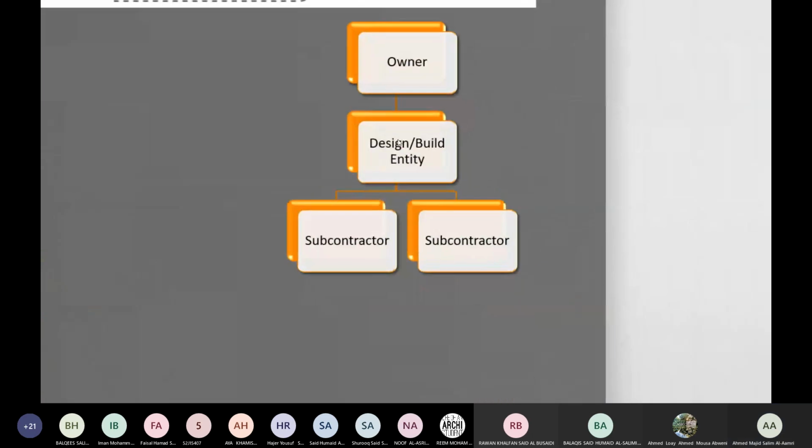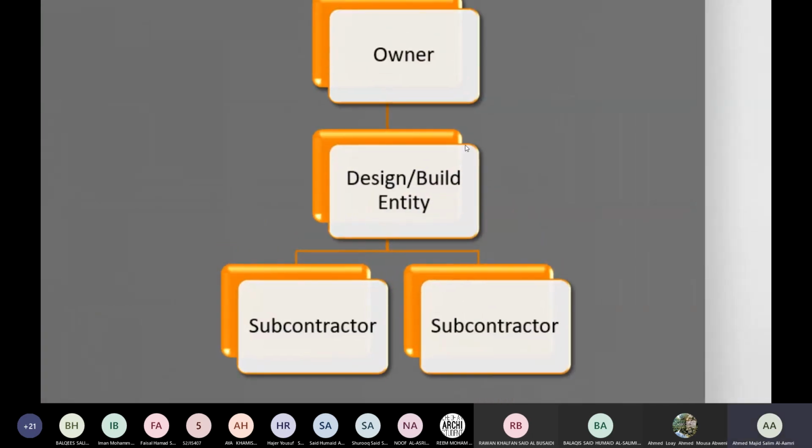Now, in this method, there is a huge opportunity for keeping a lot of foul play inside. It's a huge project. You cannot control whatever they are doing. Is it clear? That's why, in the Omani law, and I'll try to bring the Omani law for you next class, it's clearly saying that you cannot be the contractor and the consultant of the same project at the same time, unless, for example, you are doing your own project. But even then, you cannot be the consultant and the contractor for any project with the same ownership. You cannot be the owner of both companies.